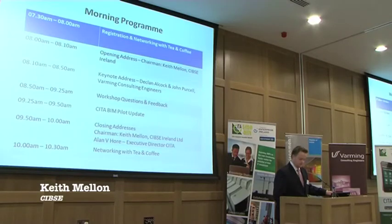Current work practices such as issuing of drawings, knowing what drawings are current and identifying changes to previous revisions are not as regimented in the commercial sector as they would be in the industrial sector. And this is a difficulty going forward that must be addressed if costs are to be controlled.